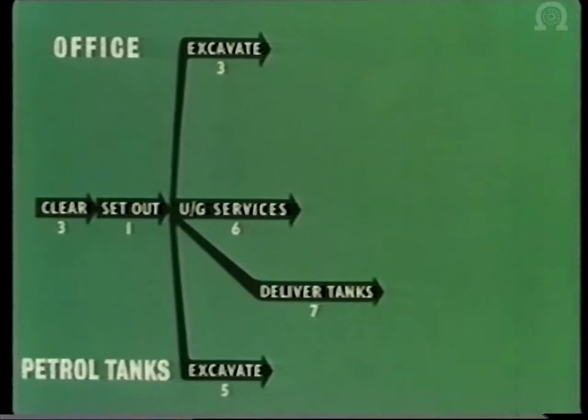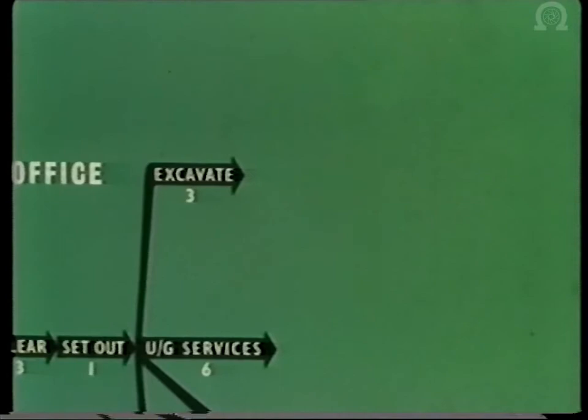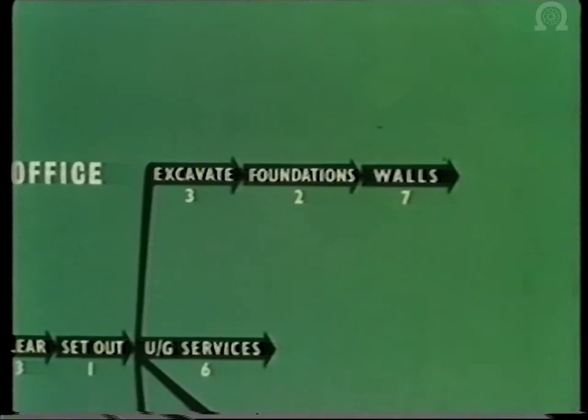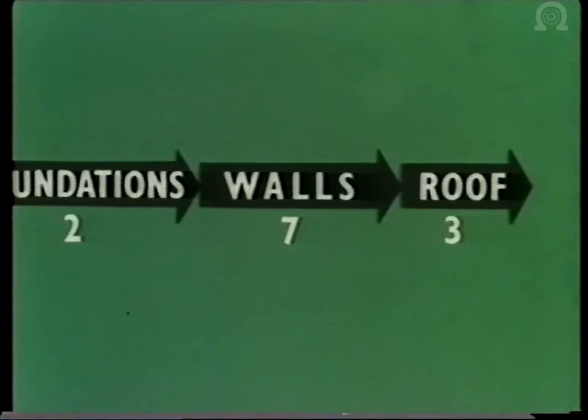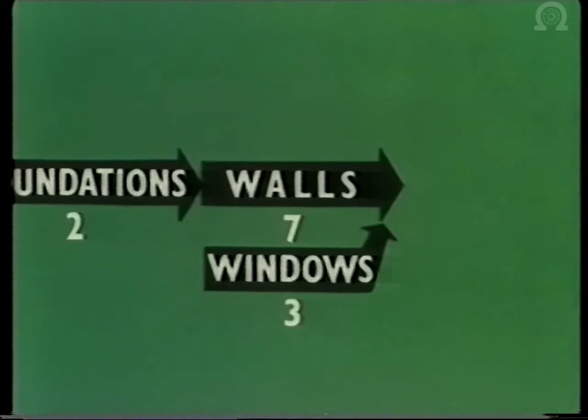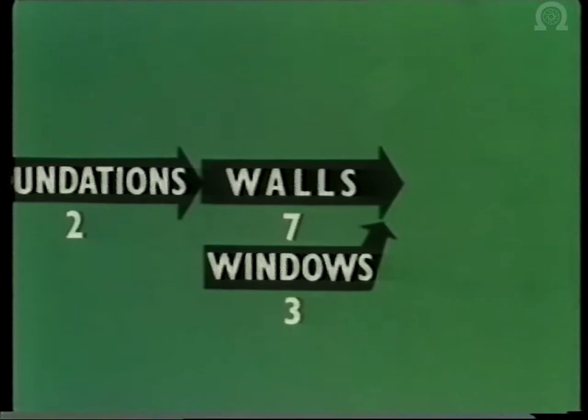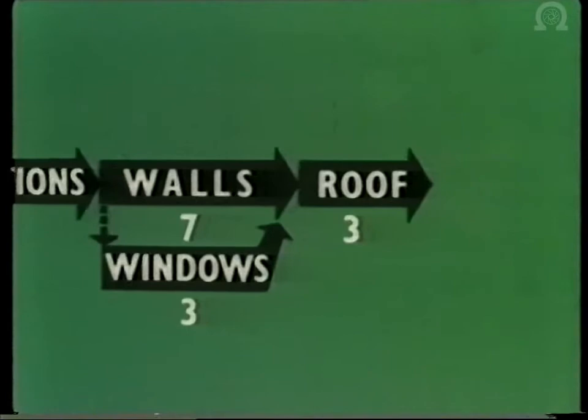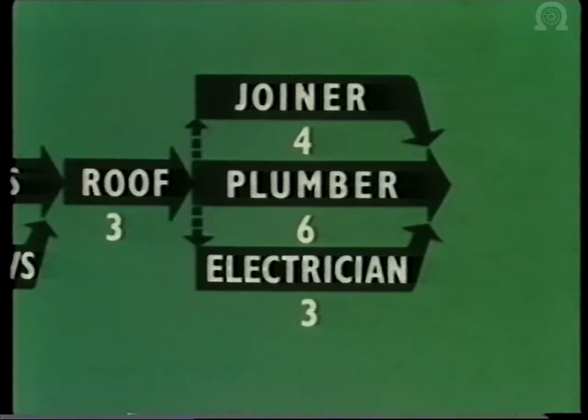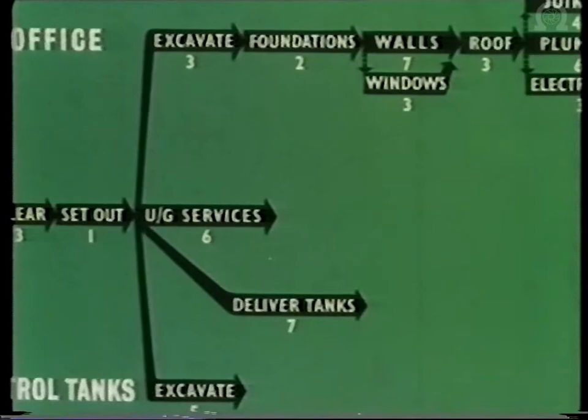Concentrate on the office building for a moment. After the excavation, the foundations are concreted, then the walls and the roof. But before the roof is started, the window frames should be in. They must be done at the same time as the walls, but they cannot be started until the foundations are finished. A broken arrow, called a dummy, links the two starting points. When the roof is on, the plumber, electrician and the joiners can all start work together. But the plumber cannot begin until the underground services such as drains have been completed. So, to maintain the planning logic, another dummy arrow is drawn in.